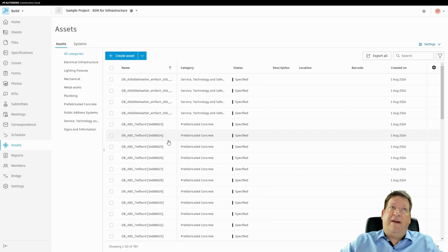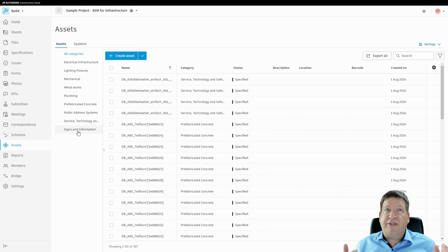And this is the advantage of having a consolidated platform that can take the data from these different models, different files, different things, and extract it, ideally as automated as possible. And again, in order to make that work, I need to agree on a common data model, so that my categories here, for example, are the same, that I use ideally the same material codes, catalog items, so that you don't need to do some crazy mapping. It's always the same. This needs rigor and good project management in order to make sure that everybody uses the same data model, but then it makes life so much easier.